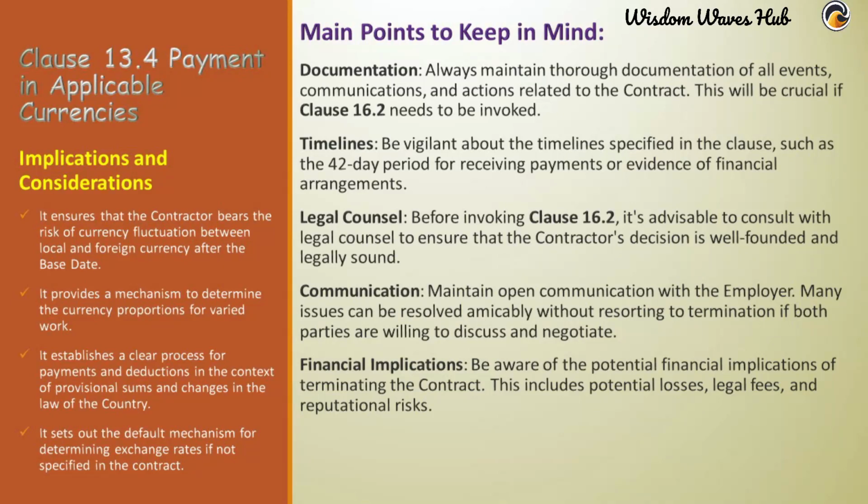Documentation. Always maintain thorough documentation of all events, communications, and actions related to the contract. This will be crucial if Clause 16.2 needs to be invoked. Timelines. Be vigilant about the timelines specified in the clause, such as the 42-day period for receiving payments or evidence of financial arrangements.